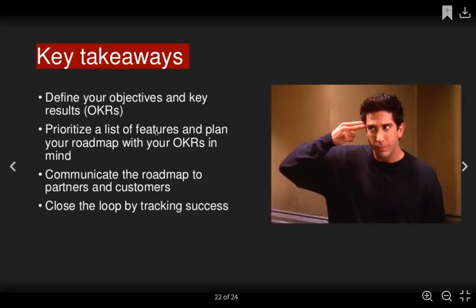The M in Moscow is things that you must build. The S is things that you should build, the C is things that you could build, and the W is things that you would. Something that must be built has more precedence over something that you could build or something that you should build. So a must means it's non-negotiable. It has to be built because it's critical.